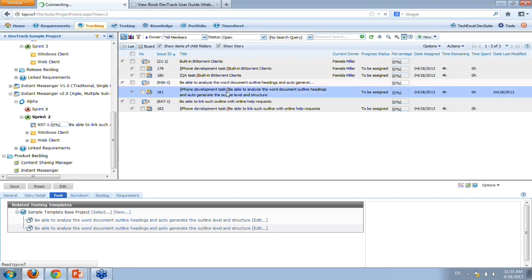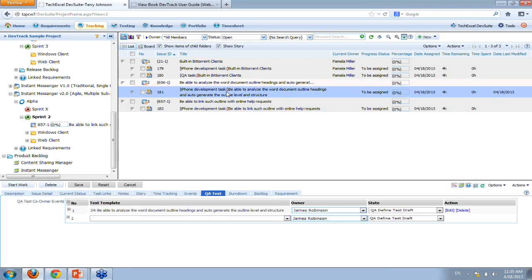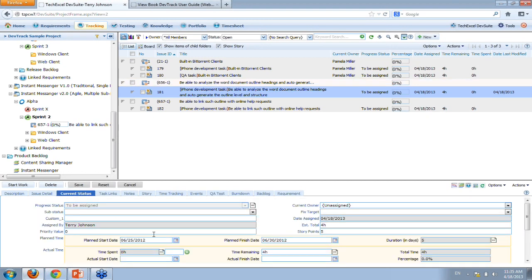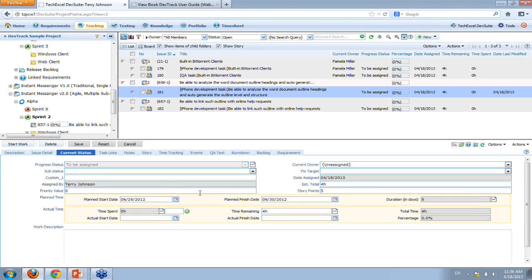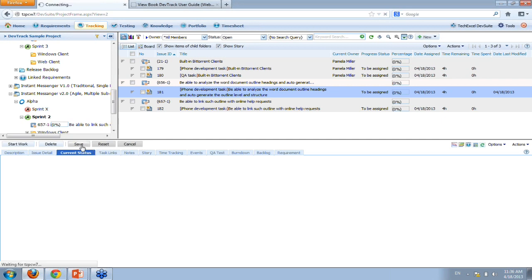So as you create a task to implement a story, often you're going to use the current status to enter the time spent and the time remain. And you can enter time spent with predefined time tracking categories, such as I'm spending 5 hours of development time, or you can just define this time spent to be a simple one-time freely editable field, and then you can also modify the time remain, so you can save it.